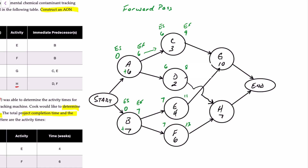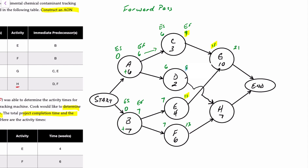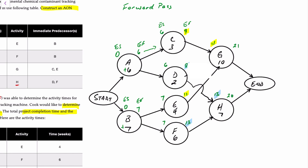Activity G is preceded by both C and E. We have to look for the larger of the two earliest finish times: C finishes at nine weeks, but E finishes at 11 weeks. So the earliest G can start is 11 weeks; it takes 10 weeks, so the earliest it can finish is 21 weeks. For activity H, preceded by D and F: D finishes at eight weeks and F finishes at 13, so we take the larger number — 13 — and add seven, giving 20 weeks. The project completion time is therefore 21 weeks, which is the longest path.